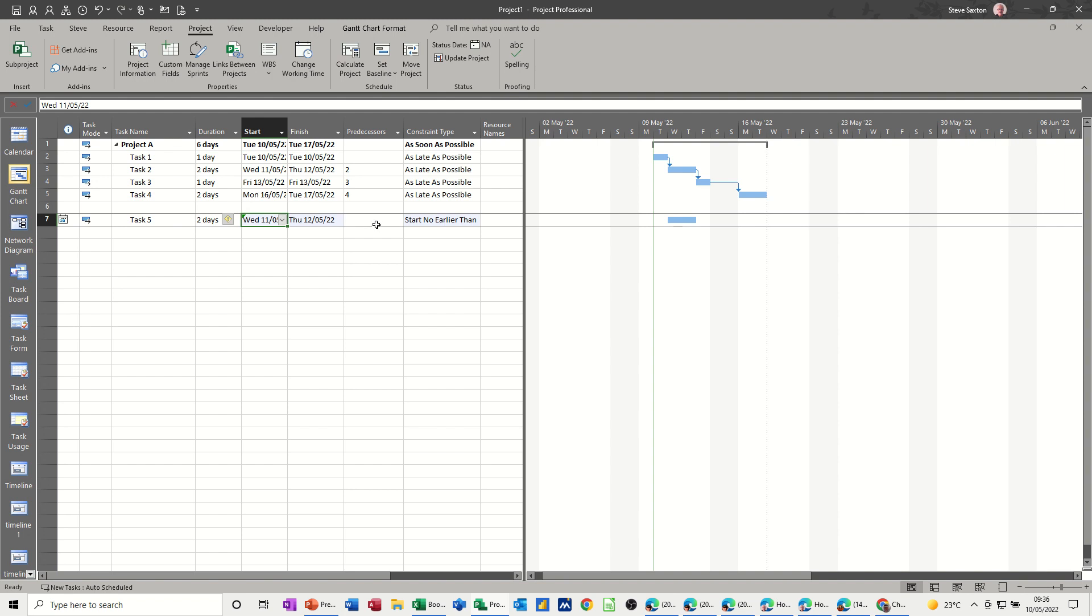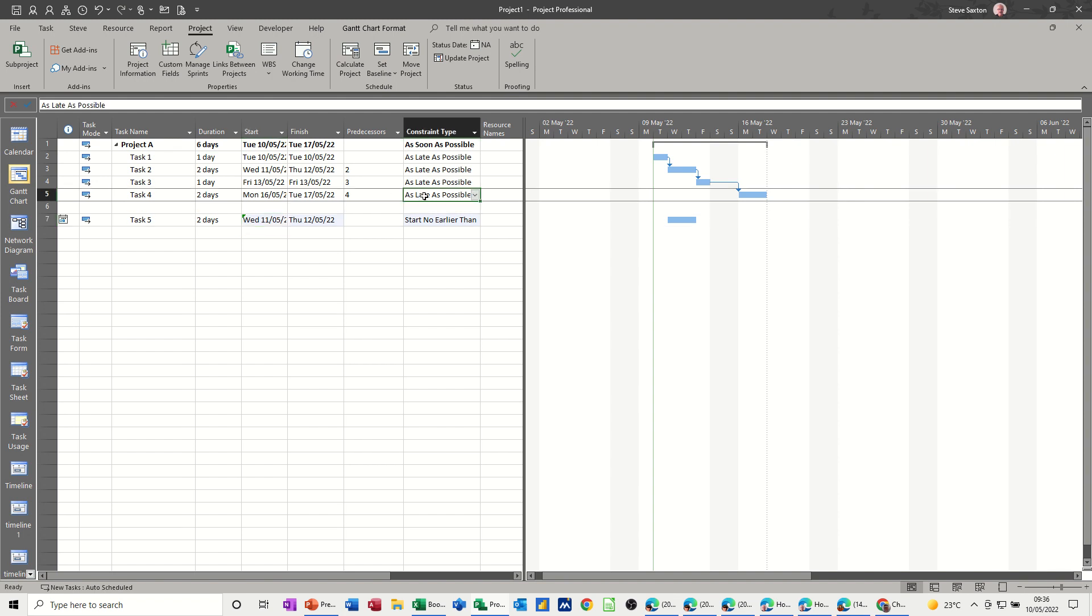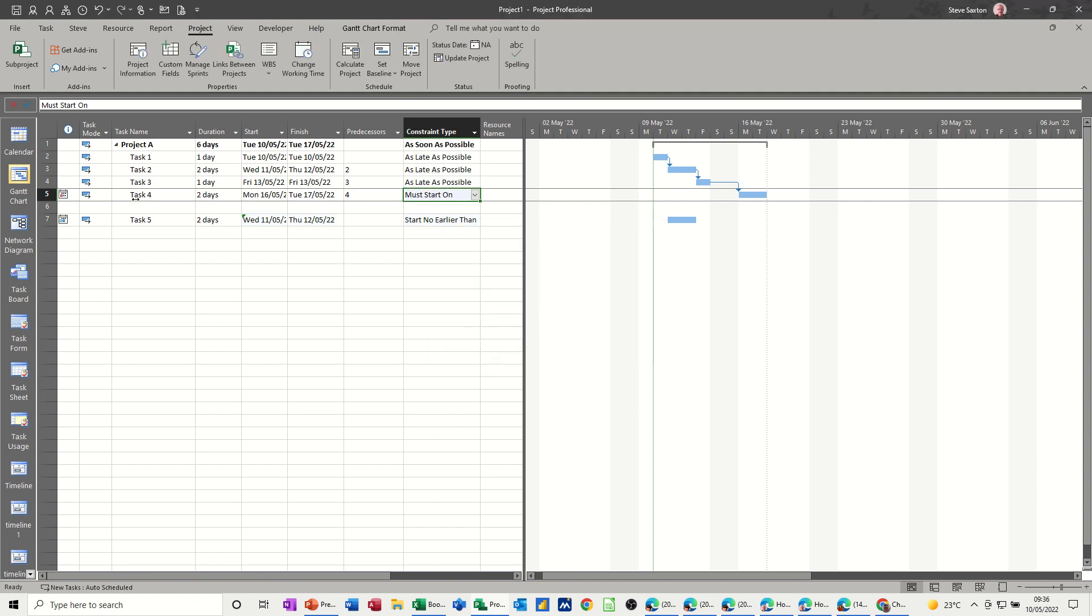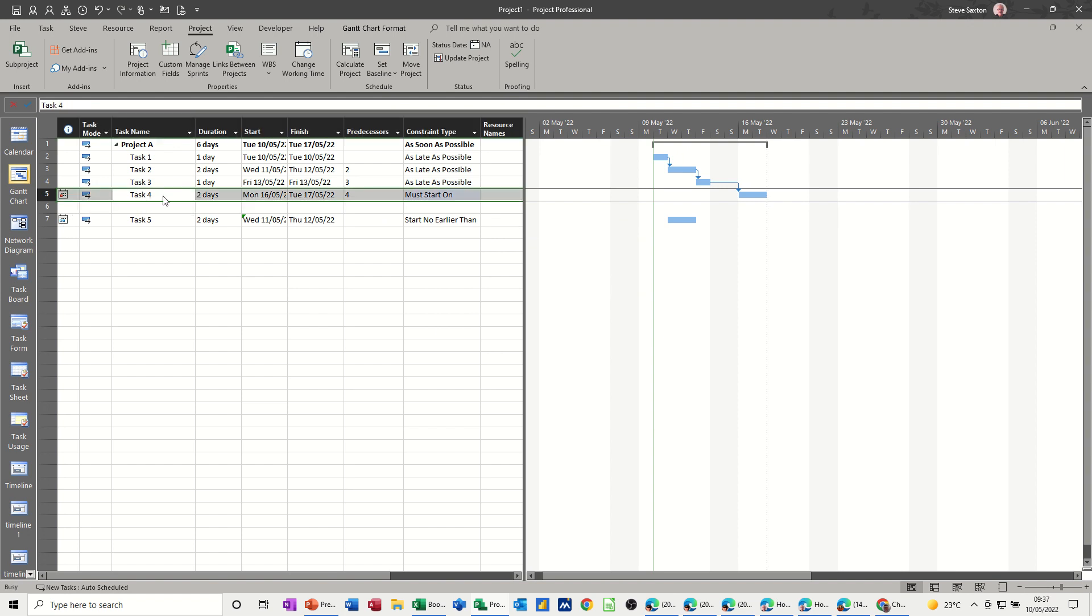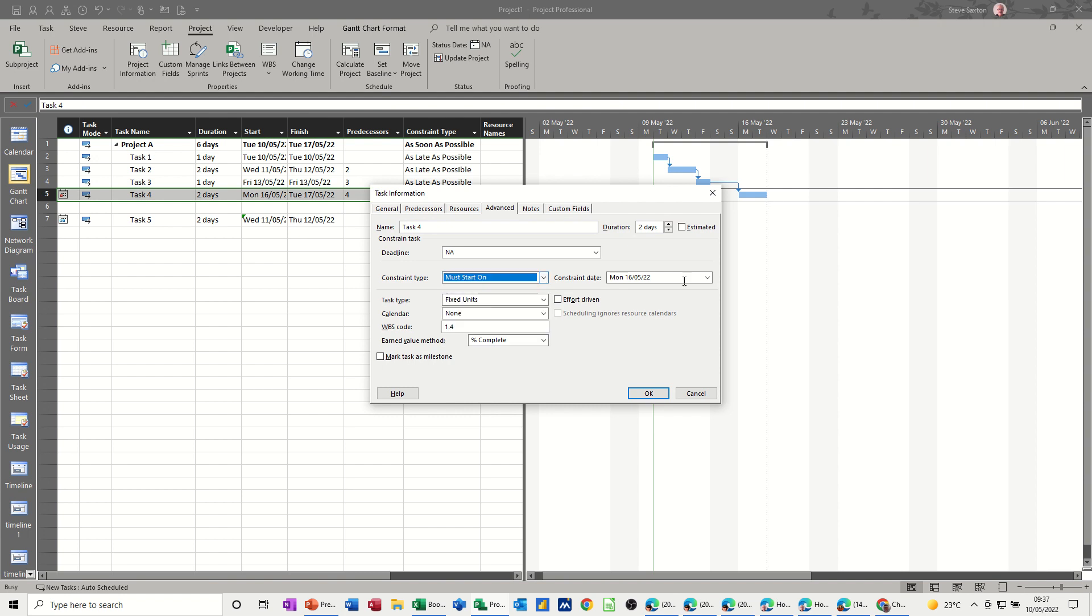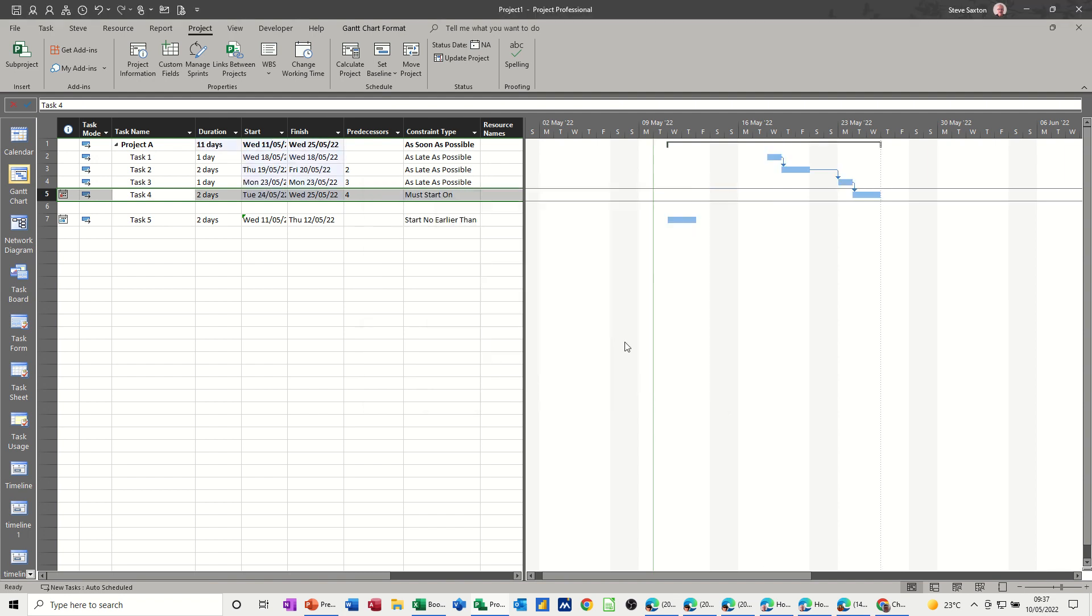So this one, for example, if I say, this task must finish on, and then must finish on will be set. You now get a different symbol in there. That one's got a blue marker. This one's got a red one. And if I just double-click into that task, you can see there it's got must start on, and that's the date. And if I change the date to go forward to the 24th, it moves everything across because they're on as late as possible. So it's pulling them with it, which is sometimes what you want. It's not always what you want, but you've got to set these up so when you move something, it reacts how you expect it to do.